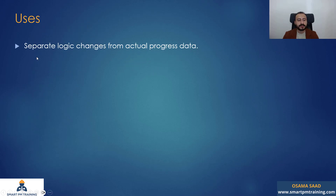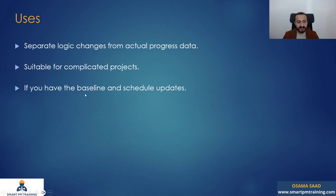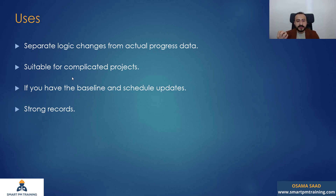Uses: it will split the logic changes from actual progress data. It's acceptable for complicated projects. If you have the baseline and schedule updates, one of the uses is when you have strong records, because — as with 3.3 — we are performing the analysis manually, comparing the planned against the as-built. So you must have strong records to justify your claim and analyze the delay effectively. If you want to perform window analysis, then it is a good method.